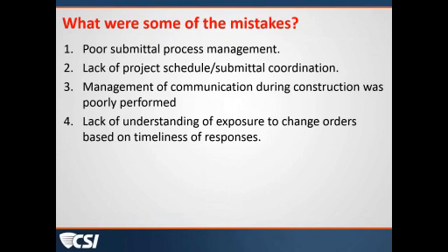I have seen several contracts where there is a set time. I would caution you that if you're going to agree to a set number of days in your contract for reviewing submittals or for responding to RFIs, I've also seen that, make sure you comply with what's in that contract. If it says 21 days, you need to do it within 21 days and not 22 or 23 days, because that's going to set you up for being liable for a delay claim that the contractors have, for him saying, well, I didn't get the submittal back in time.